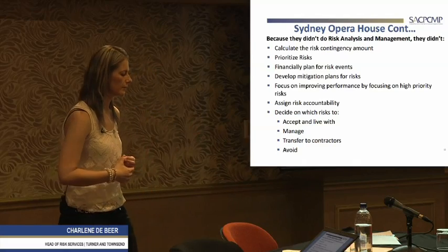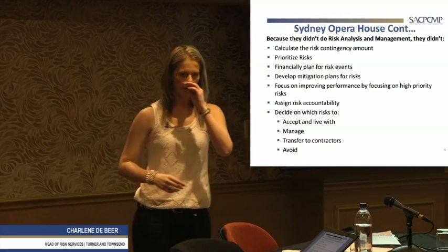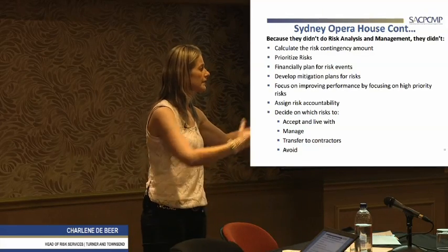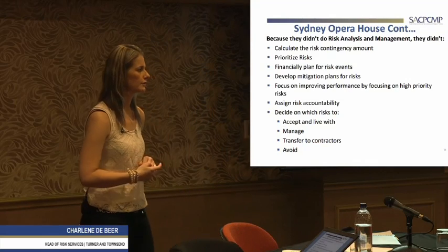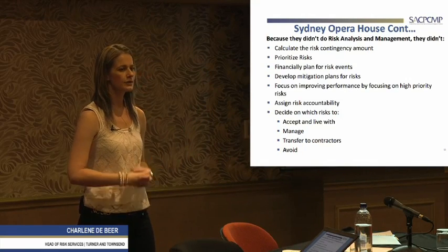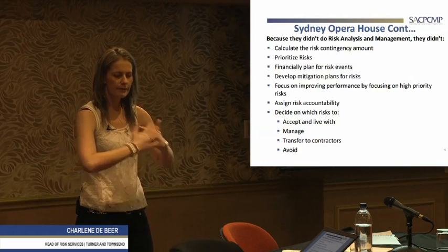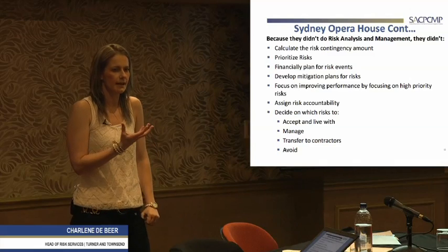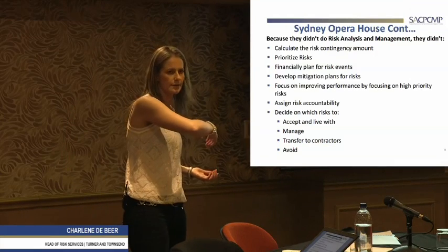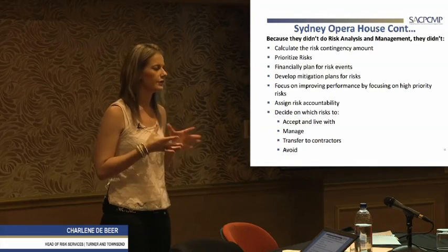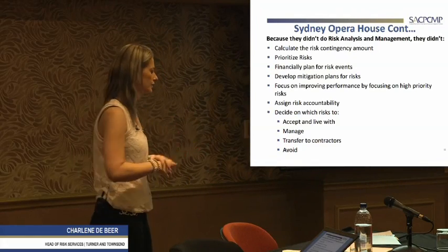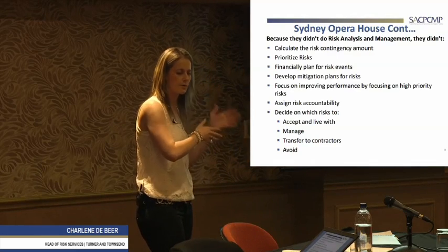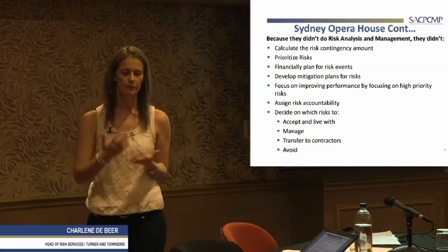And usually the procurement guy will then be, well, it's my department, I know what's going on, I'll try and manage it. If I don't know what to do, I'll get stuck, I'll escalate it to the PM or the PD, and they will assist him in trying to manage the risk. And as soon as you take 10 risks, and there's 12 people around the table, and each guy takes one, then you actually also start mitigating it. Because you're not looking at the whole risk register. You are just looking at one little thing, and all you need to ensure every day is whatever you do in your operations or in your daily work, that risk, you just keep on remembering in the back of your head, that's the risk, we need to look at a few things, etc.